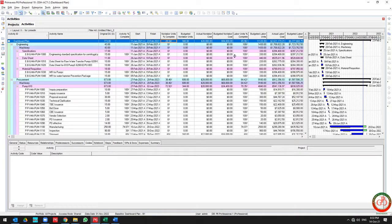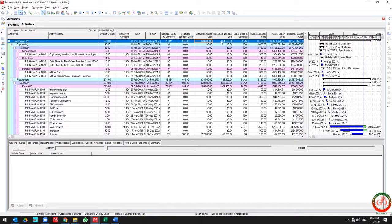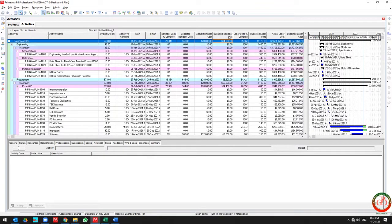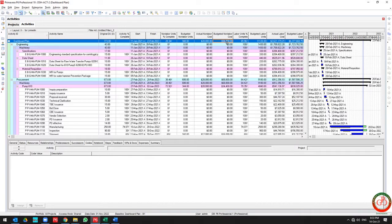Also, please note that when you use the filter for activity codes, all of the items will roll up. For instance, my total budget non-labor cost for this machinery discipline up to now is $944,000.80.